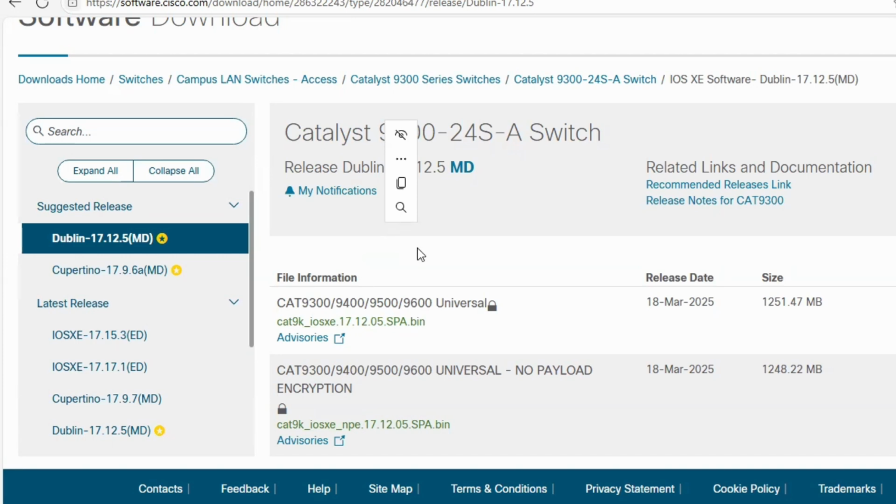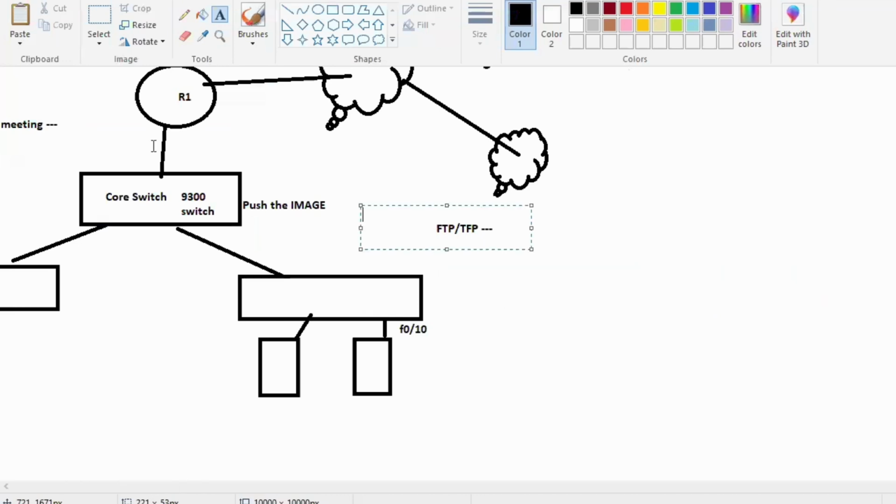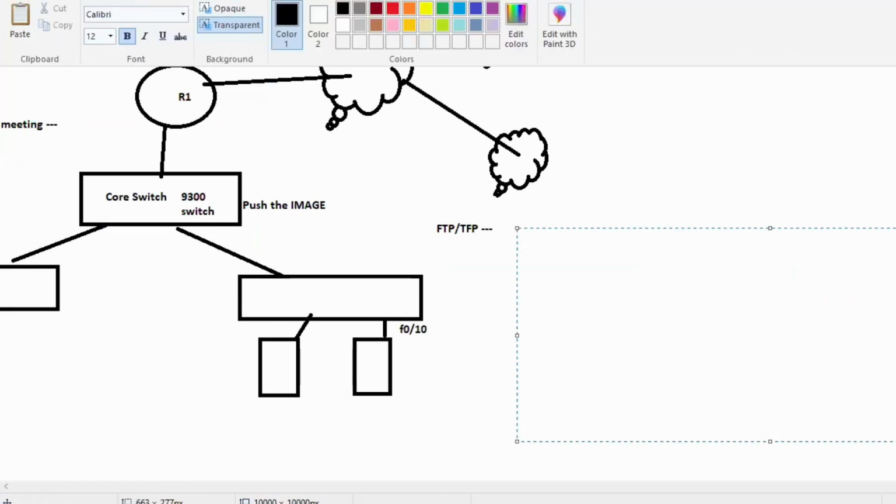Okay. Got it? So once your MD5 value is verified, all the tasks I told you, that you need to do, like image copy, everything, you need to do before the activity. Suppose your activity is planned on this Tuesday. What is the date this Tuesday, guys? It's 17, I believe. Today is 17, so this Tuesday is 21st June. Suppose your activity is on 21st June, evening 9:30 p.m. So before this activity, you need to push the image, you need to verify the MD5, everything should be in place. And then after that,